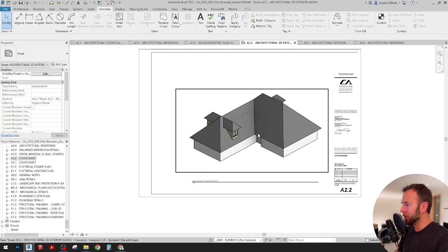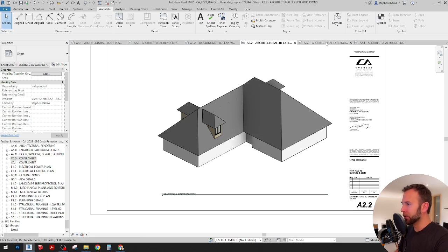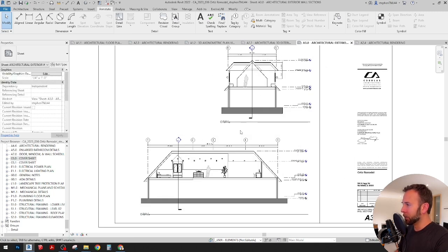of work there. We wanted to take a look at how these dormers were going to look on the exterior. That was not in the scope with our contract, but it's obviously going to be important, so we'll have to have a conversation about how much effort we put into looking at this from the exterior. And then I got a couple sections cut through here that are located on the plan.